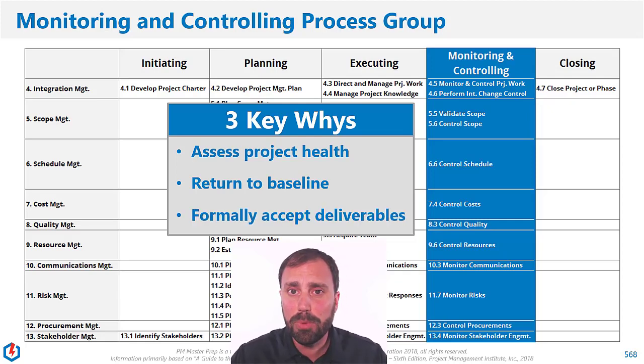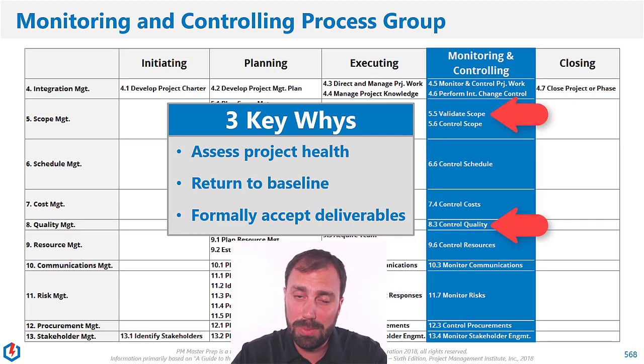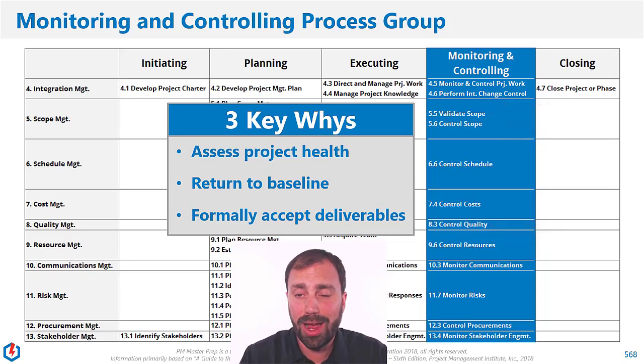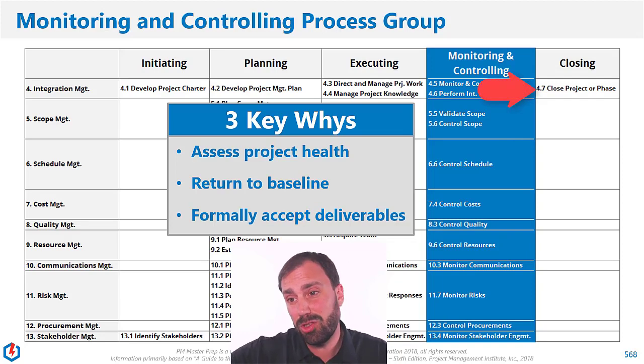And then as we're producing things and executing, we're producing deliverables. Here is where we evaluate them across two different functions. Do they meet the acceptance criteria that we established way early in the project? We're going to do that internally. And then does the customer actually accept them? So we're going to walk through the processes. There's two below: control quality and then validate scope, that evaluate these things. Do they meet acceptance criteria? Does the customer accept them? Okay. And that's going to evolve through there. And then those are going to be directed toward close project group and phase toward the last process group.